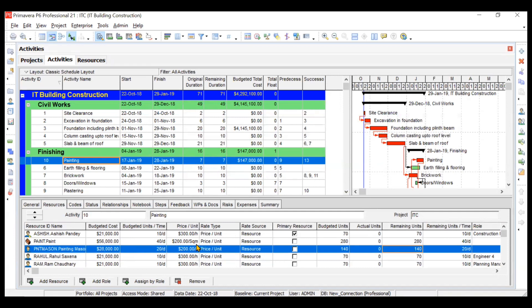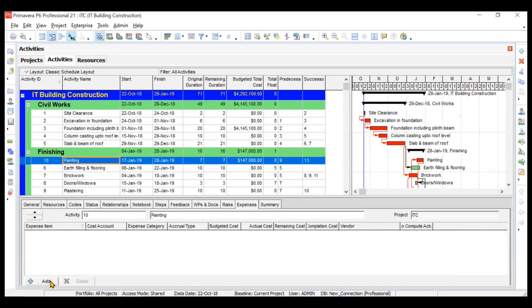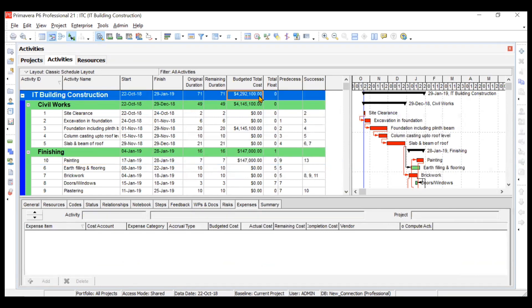This is the concept of assigning resources to activities. If you want to add any other expense, you can add it and it will be reflected in the budgeted total cost. After adding all resources for all activities, this cell gives you the total budgeted cost for your project. In further videos, we will talk more about cost parameters in detail. That's all for this video — stay tuned for more.